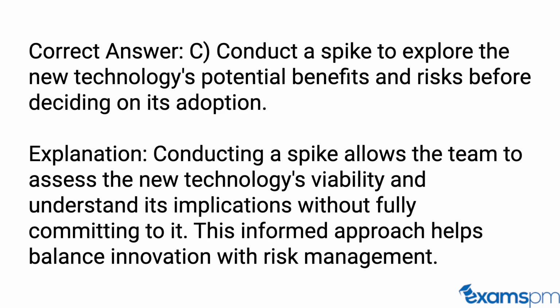Correct answer: C. Conduct a spike to explore the new technology's potential benefits and risks before deciding on its adoption. Explanation: conducting a spike allows the team to assess the new technology's viability and understand its implications without fully committing to it. This informed approach helps balance innovation with risk management.